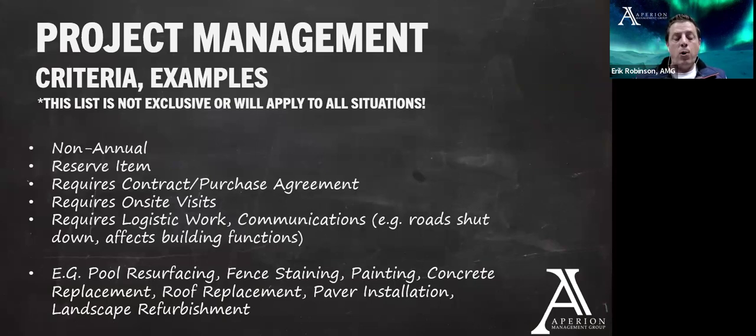It's going to require more on-site visits. If you're replacing a roof, or you're putting down a concrete coating, or you're laying down a slurry seal, the manager is going to be on site more often than your contract says for site inspections to make sure that that work and that scope is being fulfilled per the agreement.